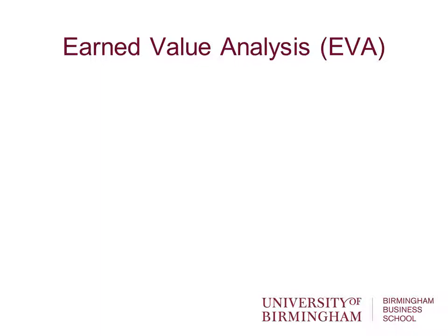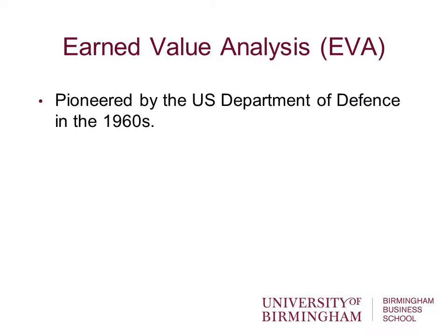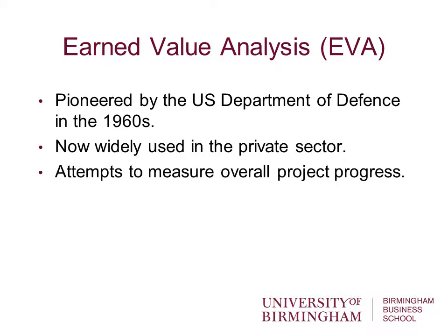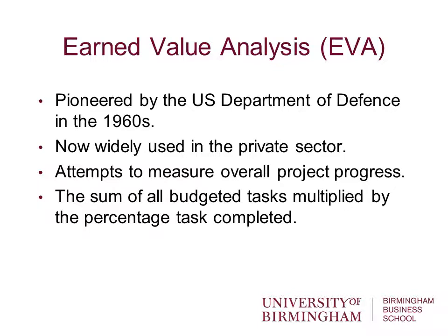Right, earned value analysis. Now this is the big one. This is very, very commonly used in projects. Okay, it's pioneered in the 1960s, widely used in the private sector. I've said that, but also commonly used in the public sector as well. Attempts to measure overall project progress. The process involves looking at the network, the original Gantt chart, the original network, the original cost plan, and distribution of costs over a period of time, and working out as tasks are undertaken how much expenditure we have over time.